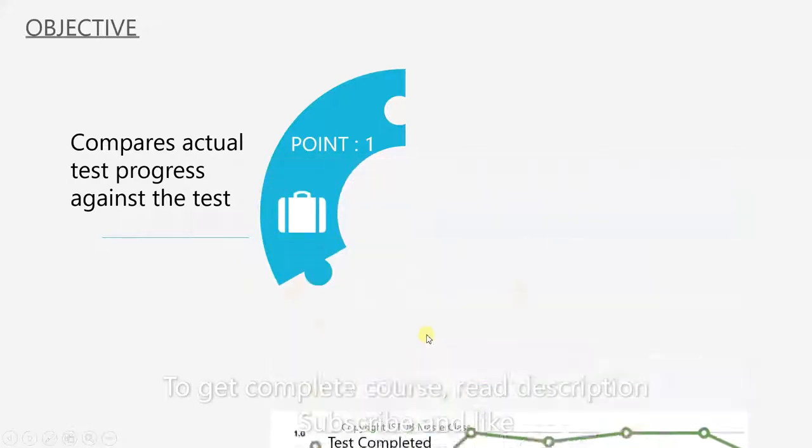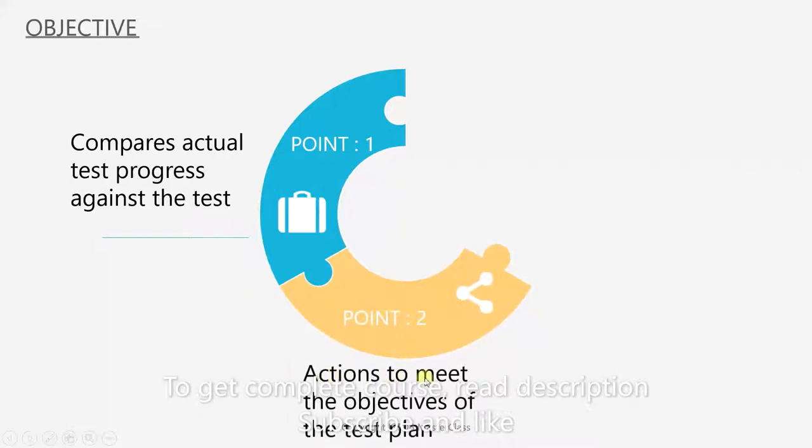But if we are underperforming, then we need to take actions to meet the objectives of the test plan. What actions can we take? Do we need to change the timetable or do we need to allocate more resources? These are the decisions we have to take by going back to the planning stage.